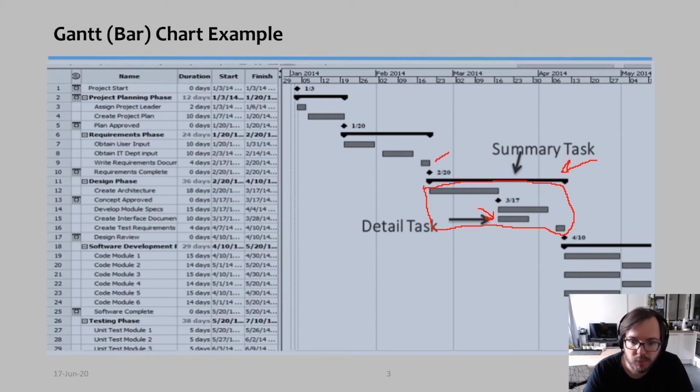And you can also represent milestones. Now, milestones look like a kind of closed angle, inclined square, and they just represent a specific date. So therefore, they have a duration of 0 days. And the software typically represents them as a dot or as a diamond or as a square, something that indicates there's something important on this specific date.